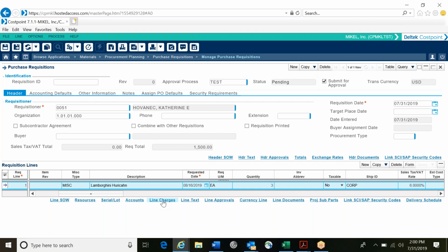But I want the purchase order, when Kay or you or I hit the button to send it, to clearly say the price includes shipping, handling, insurance, and tax, so that the vendor can't add something to it. It's a contract, and I don't want them changing it. We can put that into the notes. I want it spelled out in the purchase order so they know it. So we're going to work on that template, so that the wording in the template equals whatever goes onto the PO. If it only says this includes shipping and tax, that's what was included in the quote.